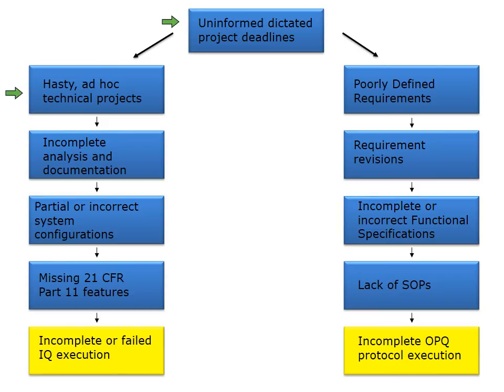You know, when these projects are highly aggressive or using new methodologies, we often see a very ad hoc technical approach taken. People are assigned quickly. They may not have a full set of requirements to deal with. They may be dealing with technologies that they haven't addressed before. They may not be trained fully yet. And they may not have a very good regimen of documentation to begin with. This all can pile up in incomplete analysis and documentation being done compared to what the real need of the system is, which we don't actually know at the beginning of projects in many cases.